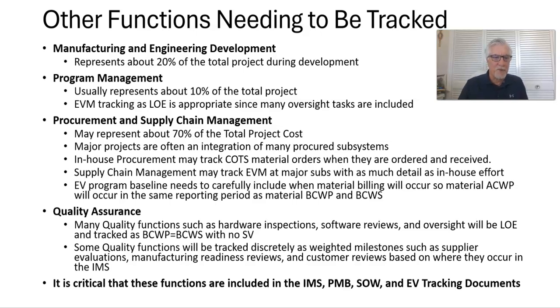So that brings us to procurement and supply chain management, which, believe it or not, represents about 70% of the typical development project. That means most times the project is an integration function and is procuring many of the subsystems from various subcontractors, and of course procuring COTS parts, commercial off the shelf, resistors, capacitors, and many other off-the-shelf parts.